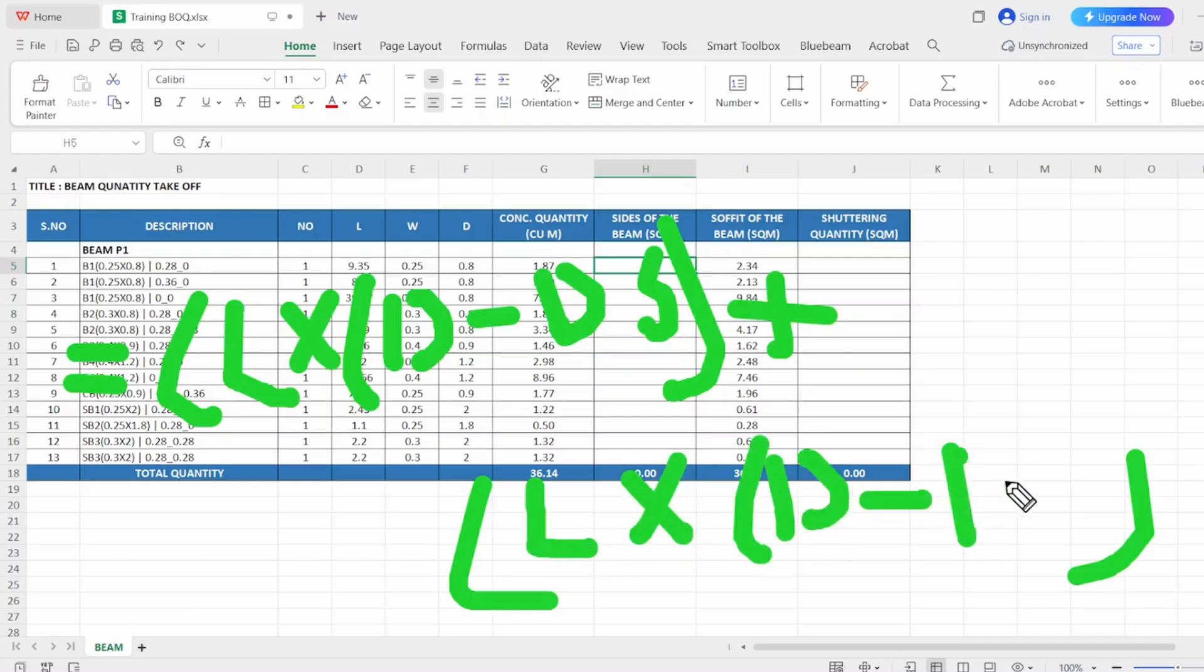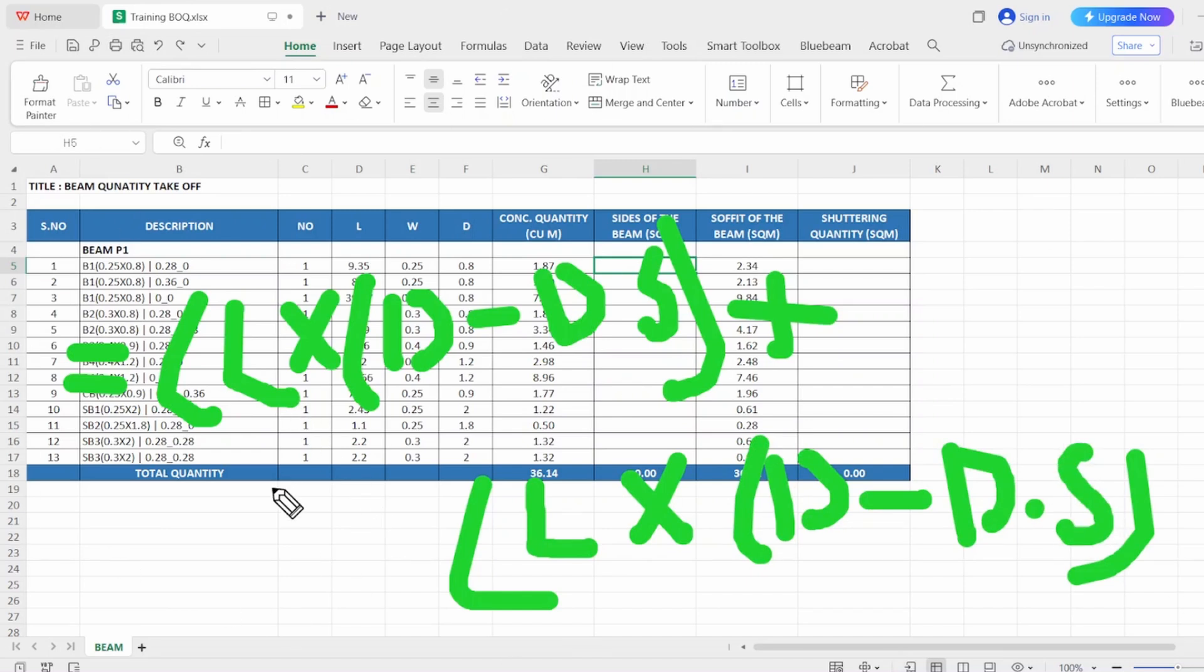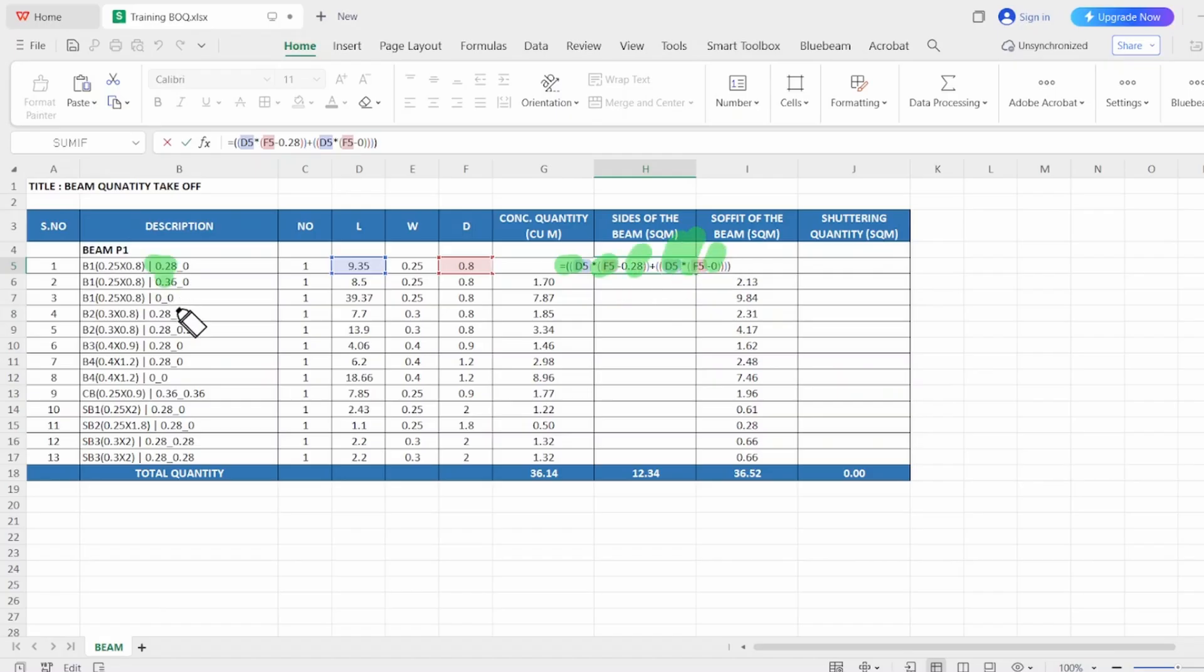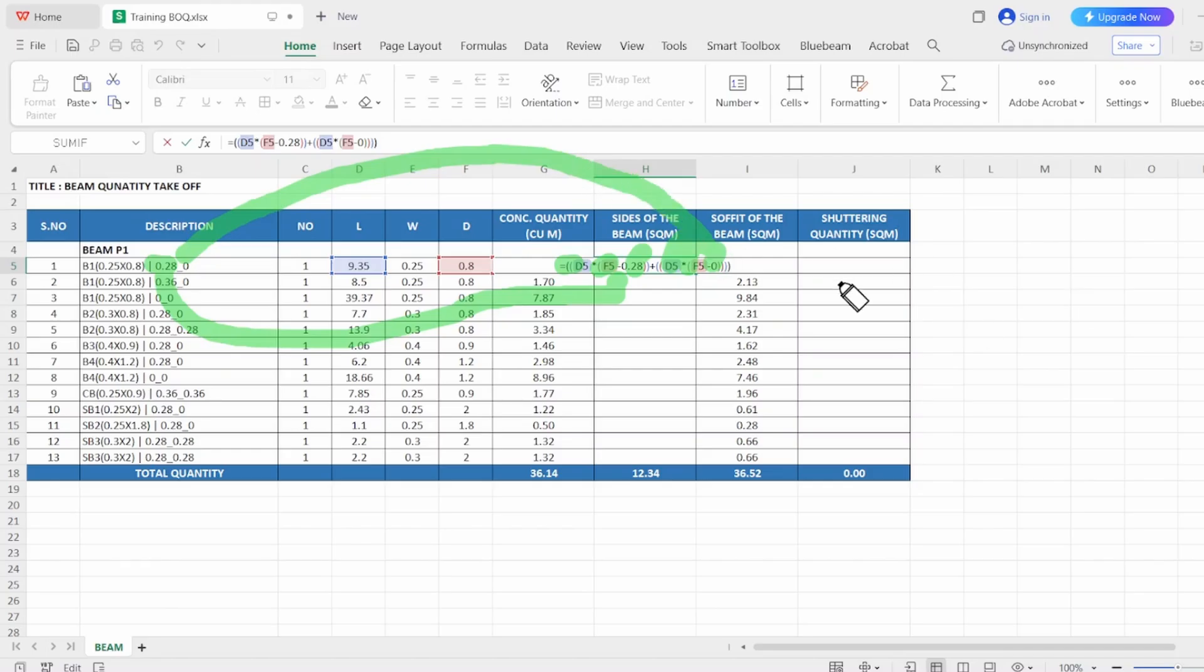Here you can see I have made a formula simple: length of the beam, depth of the beam, depth of slab. Length, beam, depth—0.28 will go here and the zero will go here. That's it.